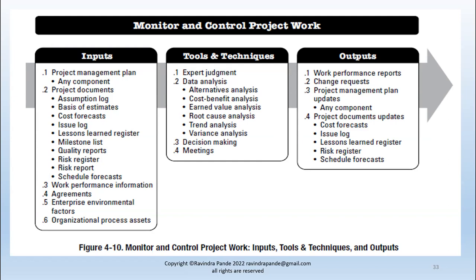So learning curve means the time taken by a resource to learn similar things, right? So there I need to absorb such timings within my schedule. If Ravindra Pande doesn't know how to fit the biometrics on the doors of the client's attendance management system, I need to make sure Ravindra Pande learns from somebody, a COE expert, and gets it done with him the first time.